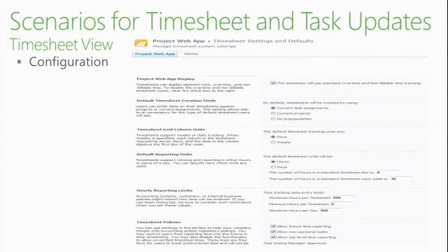Here you would have the maximum number of hours per day, at the bottom, in the limits, where you could set the utmost maximum number of hours per day that a user can report. If they try to exceed that, the system will tell them no. But what is the 8 giving me? If I put 20 in maximum hours per day and I leave it at 8 up above, it's still not going to let me go beyond 8, right? Or is that going to override the previous one?